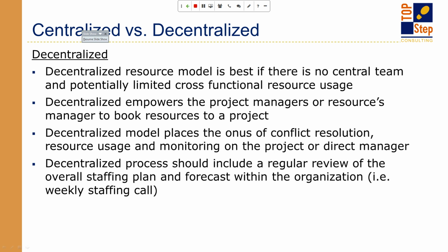We at TopStep recommend holding a regular, ideally weekly, resource staffing meeting so that all of the different decision makers in the organization, basically anyone who has a vested interest and has the power to book or manage bookings of the resources, gets on a call and talks about the overall needs of the organization. That way that information isn't siloed. We're looking at an organization-wide level.